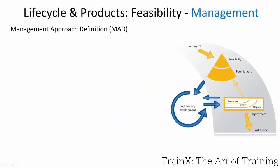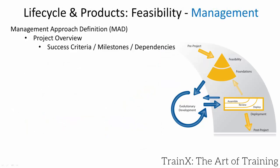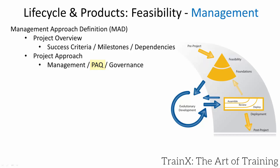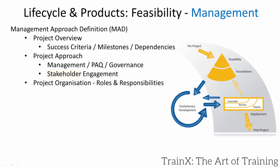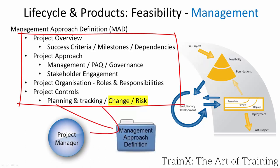The management approach definition documents success criteria, reporting milestones, and any inter-project dependencies. Governance may be rigorous or relaxed. The project approach questionnaire, or PAQ, helps determine the organisation's understanding and acceptance of Agile PM's usage. Communication requirements to various stakeholders are described here, as are roles and responsibilities, along with any variations from Agile PM's recommendations. Stipulations on how to manage risk, change, and exceptional circumstances are also described.